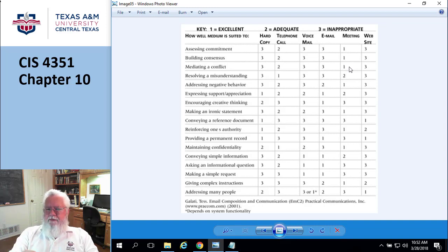If this was a construction job, what's the progress for the electrician? Oh, well, he's three-quarters of the way done, all right? That doesn't tell you when the house is going to get built. It just basically, you pick one topic, what's the progress for that? And it could be that this progress report is based upon feedback from other parts of the organization. For example, a monthly progress report is probably not a new document. It's just a summary of all the weekly progress reports.